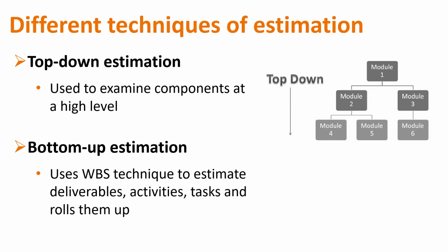In an iteration, you could have anywhere from 1 to 15 or 20 user stories, depending on the total combined points or effort that you allow to move into a sprint, right? So you don't estimate your sprint, you estimate all the user stories that are in your sprint, and that adds up to what your sprint is, right?